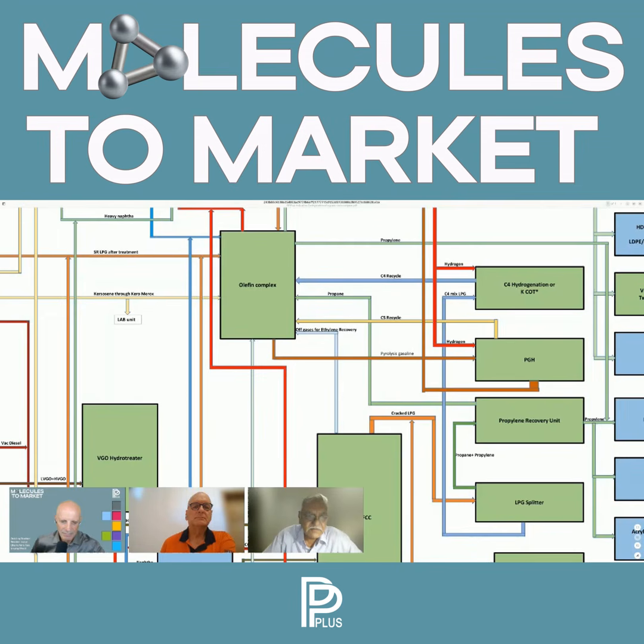And in this mode, the owner hires a consultant. The consultant does everything. They do the basic engineering, they do the detailed engineering, they do the procurement instance, they do the recommendation for purchase. Owner places the orders and the contracts, and that's how you build the project. The only problem in this mode of implementation is the owner needs to have a very large management setup on their end also, in addition to the consultant's own management team.